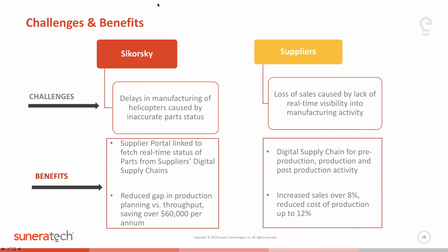We actually were able to help change the entire layout of the priority system for the entire supply chain for Sikorsky aircraft. We were the second company that Lockheed had gone into to find out why priorities were being screwed up. And it was because there were so many managers, division managers, and program managers at their company asking for parts that didn't really have a high priority. So they were putting low priority parts over high priority parts because nobody was talking to each other.